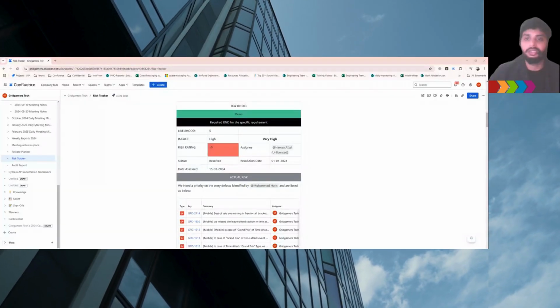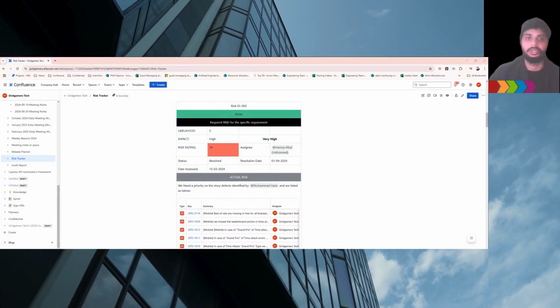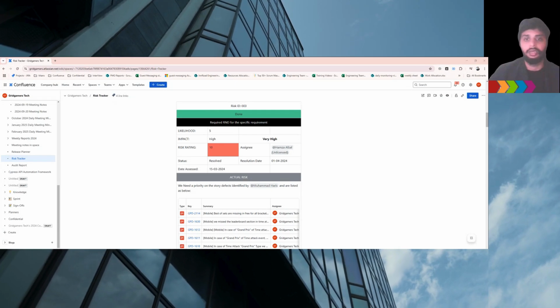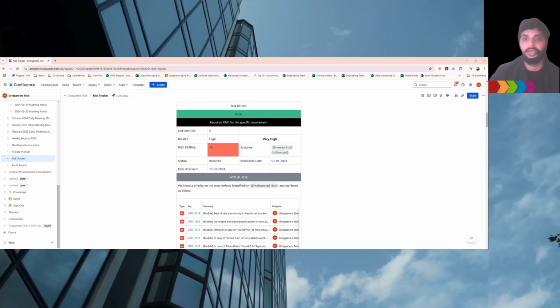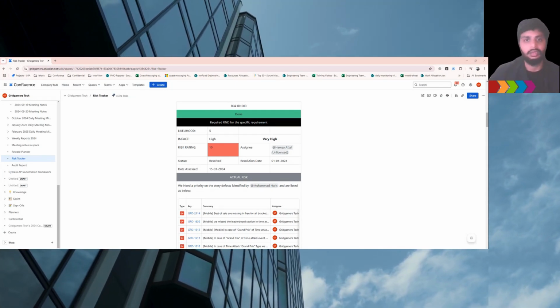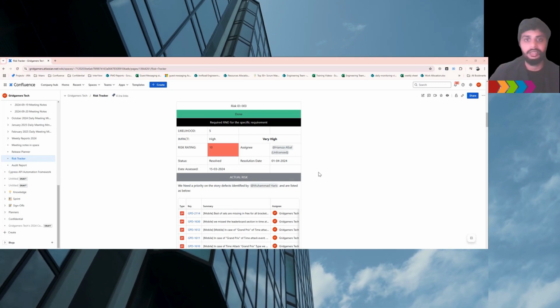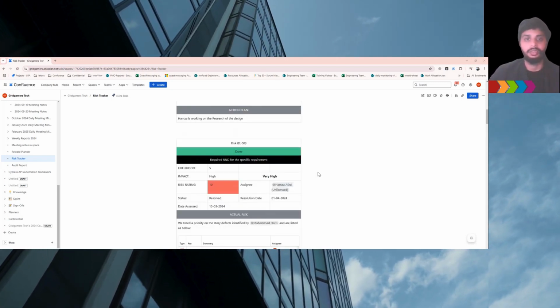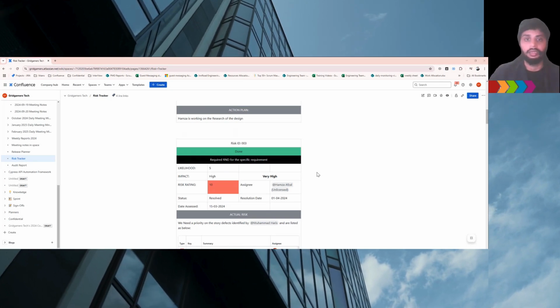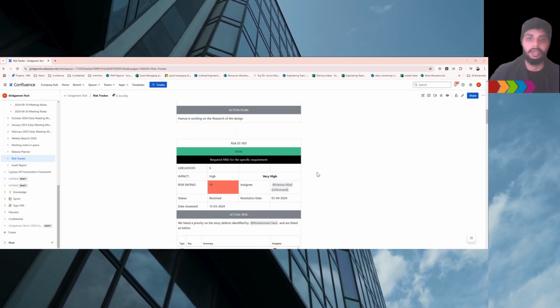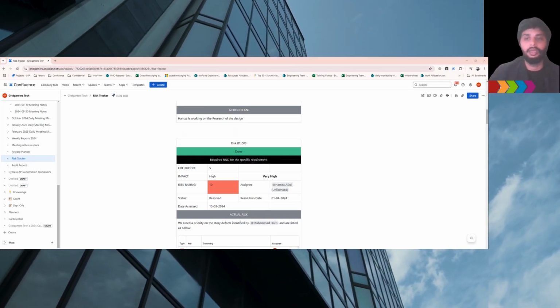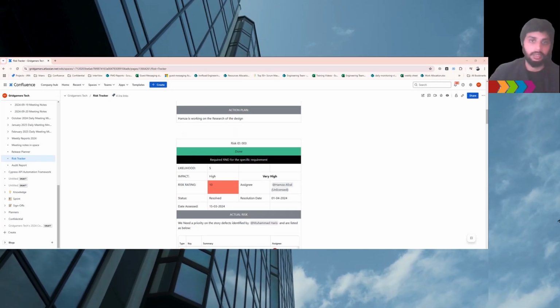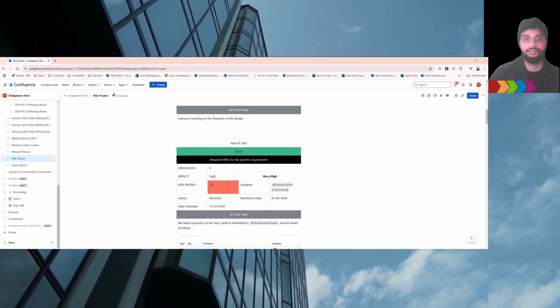What is the risk register? Whether you're a project manager, a developer, or just curious about project management, understanding the risk register is essential. Let's get started. A risk register is a document that contains all identified risks, their potential impacts, priority, probability, response plans, and assigned owners. It is a living document constantly updated throughout the project lifecycle.